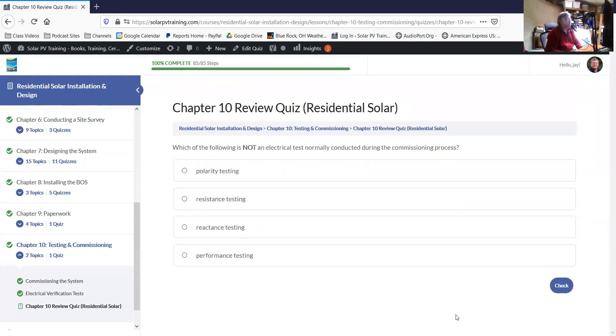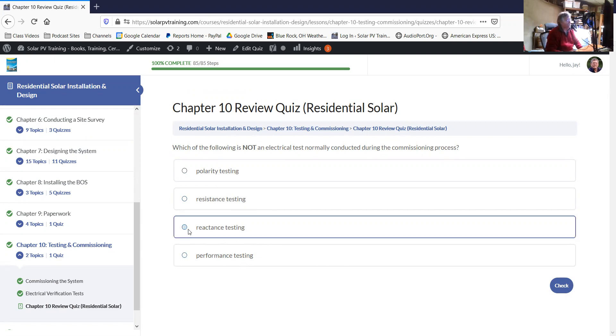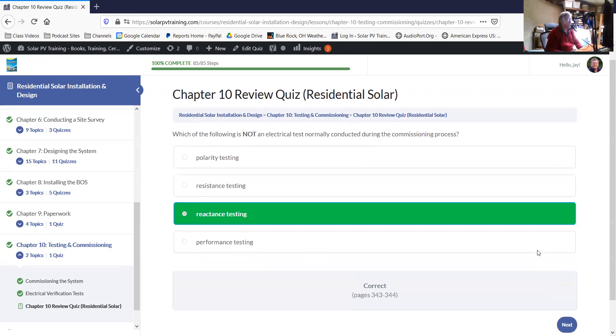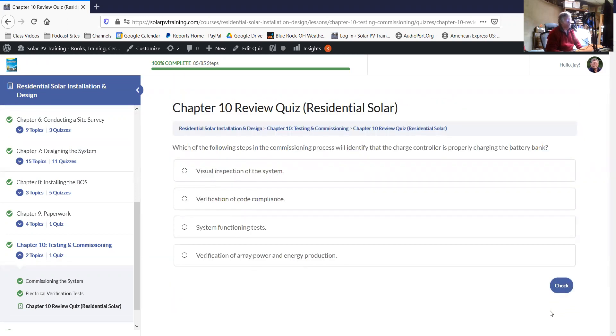Which of the following is not an electrical test normally conducted during the commissioning process? There's polarity tests, you want to make sure that all of your connections have the right polarity resistance, like a continuity test or to see if there's excessive resistance, performance testing of your units. A reactance test is just something I made up. So it's not one that you want to have in your arsenal of tests when you're starting the system up.